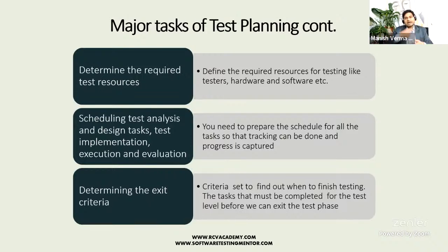So build happens incremental, the development and testing happens incremental, but then there will be a high level plan for the whole 3 months release as well. So for that release, when we need to have the vendor build, when we need to have the internal build ready so that we can do full end-to-end testing to release it after 3 months of the development cycle using the Scrum framework. Okay, so that's basically how it happens.